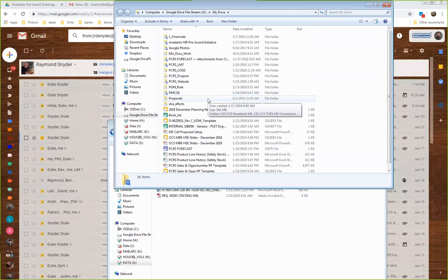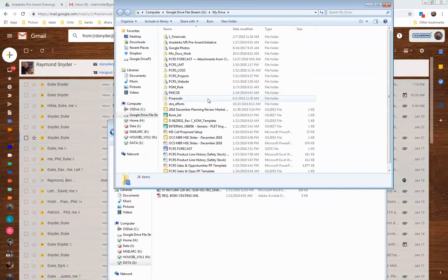However, there are times when we'll take it from inventory and replenish it. Lately we have been lacking on that, so I think we need to tighten that up. But we just want to buy it to the project if there is a use for the inventory item. Unless Ben says, I don't know when I'll be able to use it, then let's consume it, so we don't have stuff just sitting around. So there is some of that give and take in there.